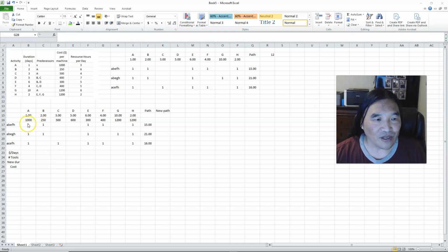So what I really need to do is not only look at it to figure out which one should I go after, which are going to be the cheapest, but instead of looking at this, what I should be looking at is, for example, if I get another A machine, all of a sudden that affects all 3 pathways.